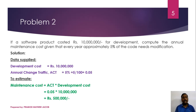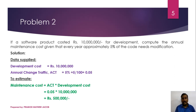The development cost is given as one crore. Annual Change Traffic ACT equals 5%, which is 5 divided by 100, equal to 0.05. Maintenance cost equals ACT into development cost, that is 0.05 into one crore, which equals five lakh.